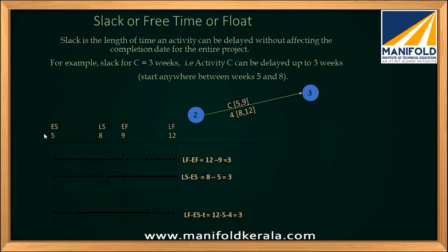Now, what is the latest? The latest I have to start is the 8th week. I cannot go beyond that. That is my deadline. I must start in the 8th week because the latest finishing time, the deadline for this, is the 12th week. If I start at the 5th week, I will complete at the 9th week. If I start at the 6th week, I can complete it by the 10th week. The latest I have to finish is the 12th week.